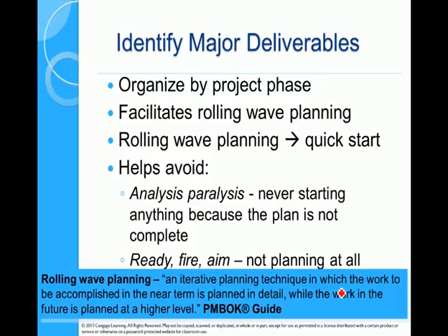What they're suggesting here is a rolling wave plan, where you put detail into the first part of the plan, what you think needs to be done, for example, the foundations, but you don't plan out the roof at this stage. You know that the roof will occur. So this allows you to really focus on what's next and have a bigger picture in a more broad or coarse format.